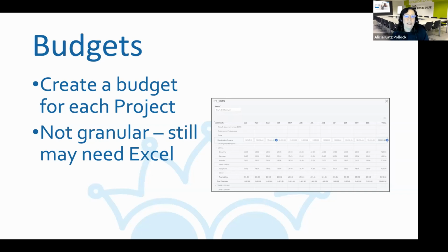And so there's still a need either to use Excel, or that's where Knowify and Buildertrend come in, because you can actually spec out the whole job on an equipment rental by equipment rental basis, or every single supply that you're going to need. And then you transfer those totals into the budget or into the estimate.